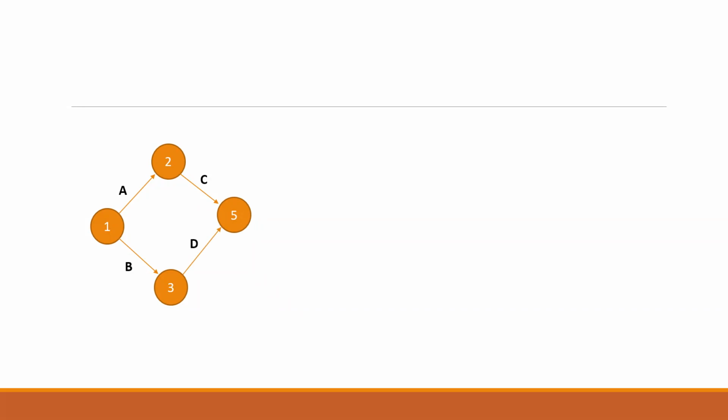Now, why we have merged C and D is because if you look at activity G, we have activities C and D coming together. So the immediate preceding activities C and D are merging together. That indicates that there will be one node where the arrows are going to merge, and these two activities have to merge into this particular node. The number, as I told you, will be given by me later on. I'll show you the logic of giving the numbers. So C and D are merging together.